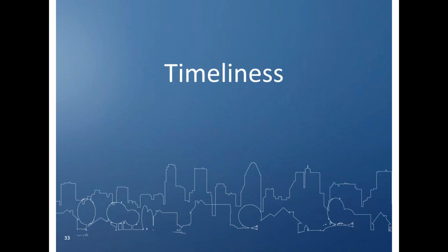Yeah, this is Tyler. I'm in agreement. I can't remember the exact language in the 2 CFR 200, but it basically says costs that a prudent person would pay. So if you would use your own local government funds in that same manner, then that would be reasonable. Whereas you wouldn't go more extravagantly because it's now federal funds. But in terms of the requirement for the market study, I think the example that you gave was a good one. And also, if it's really complex or you're really unsure, you should always contact your CPD rep about a specific cost reasonableness question. Good. Thanks, Tyler. Okay, Brandy, next one.